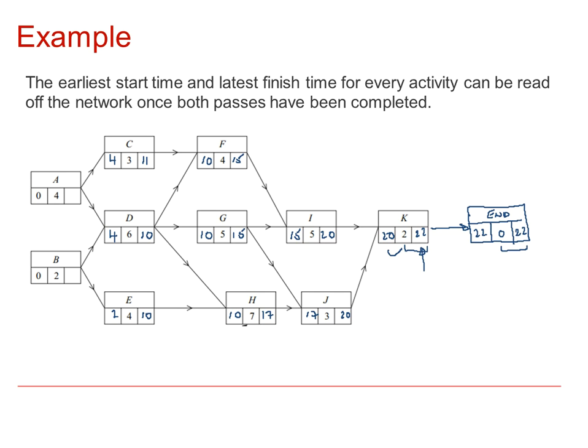And then finally working backwards, from C to A would give 8, from D to A gives us 4, so that will be 4. And finally B, 4 from D and 6 from E. So there we've got a lower value of 4.